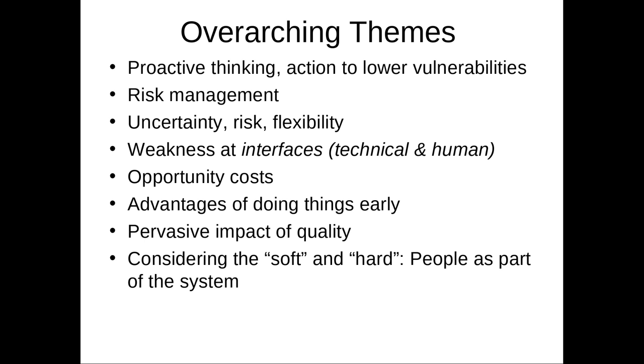Advantages of doing things early. Getting things in place early. Doing code freezes early is a good thing, with a capital G, and I would add a capital T. Getting in place certain risky decisions to evaluate them with a spike prototype. What's a spike prototype? A throwaway prototype. Yeah, it's a throwaway prototype.